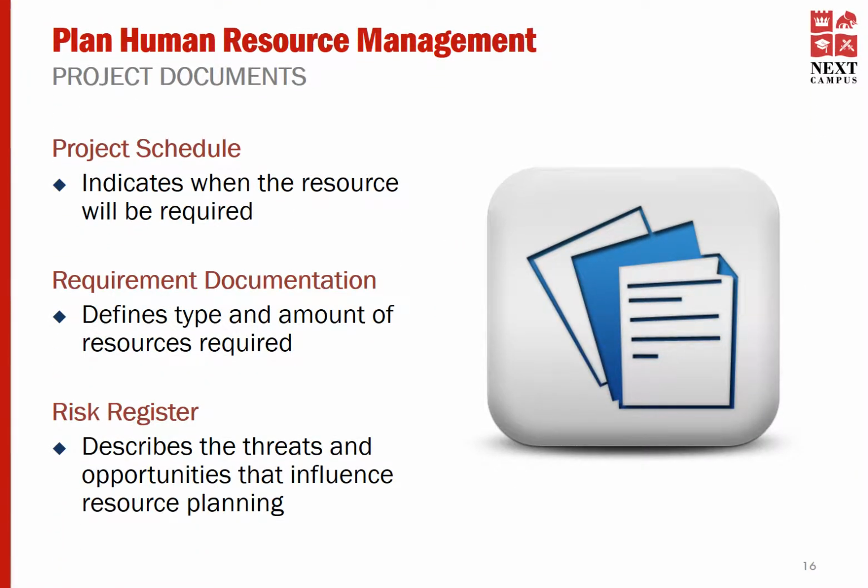Project schedule among the project documents is one of the documents that impact the resource planning. Project schedule will indicate when the resources will be required for the project. Requirements documentation is another document that is important as an input for resource management activities. Risk register can be another handy input as it describes the threats and opportunities that influence resource planning.